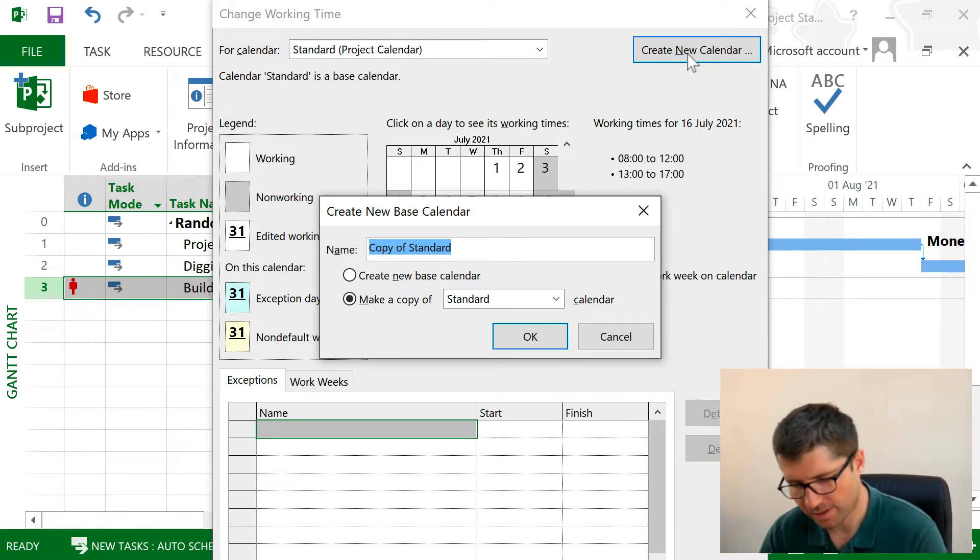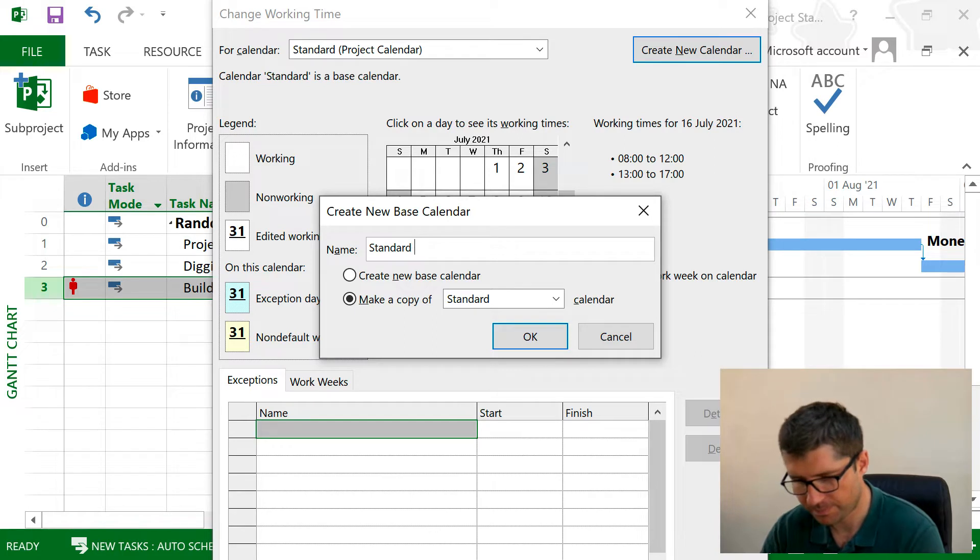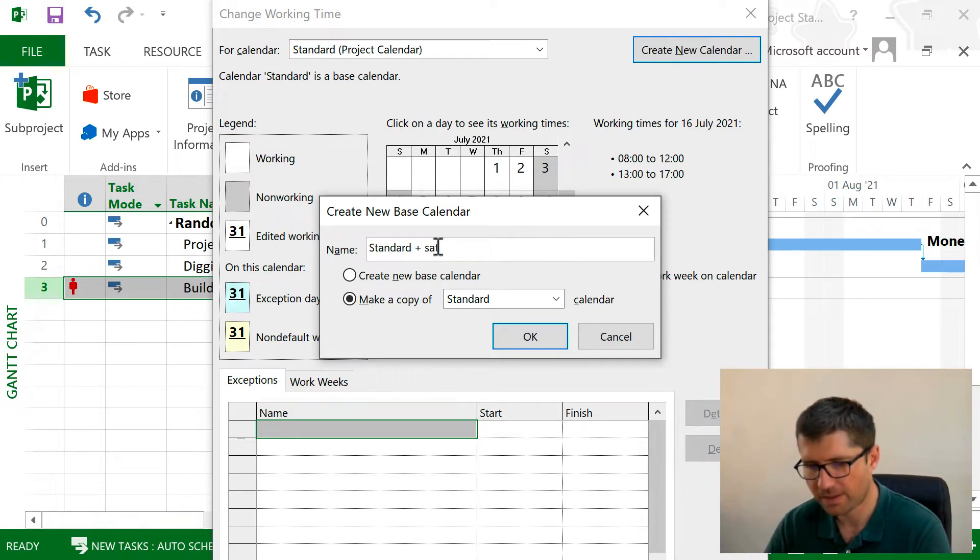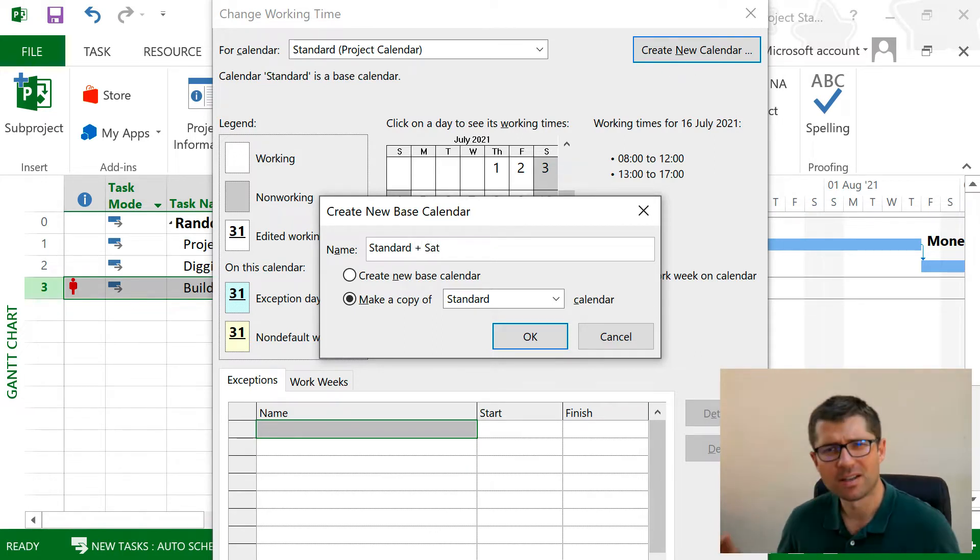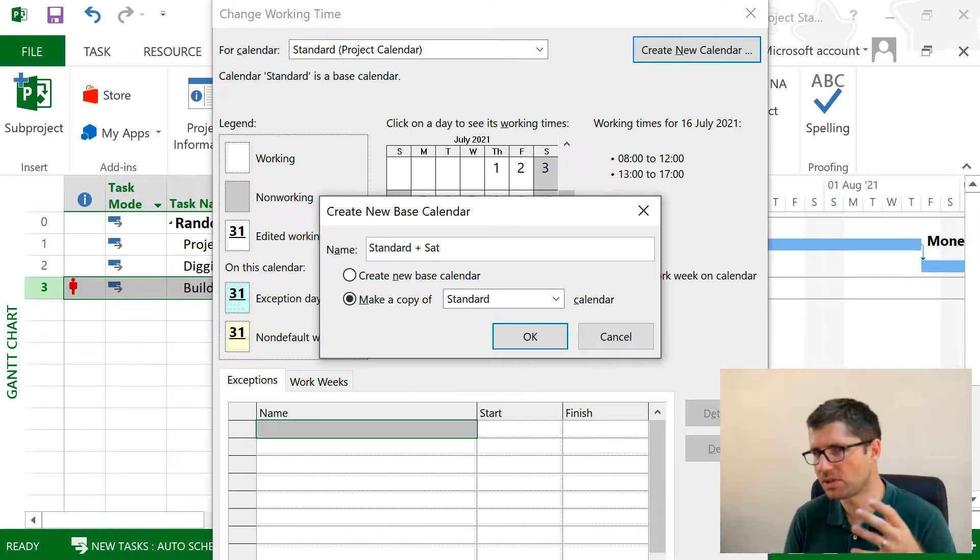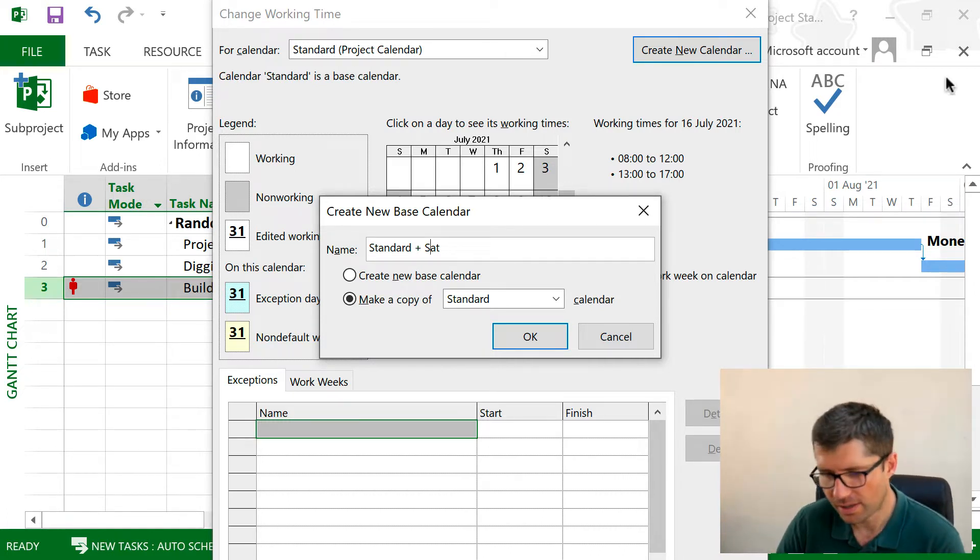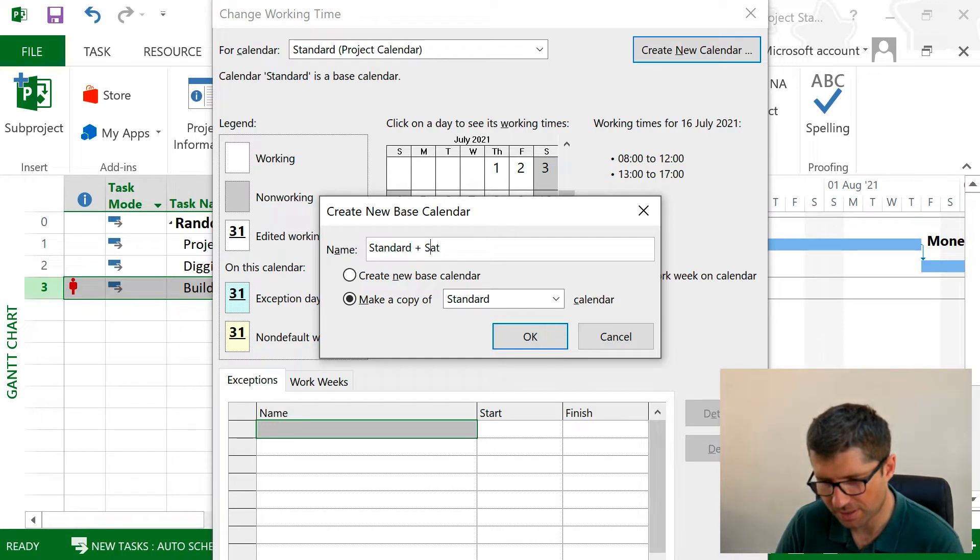Now let's have Standard Plus Saturday as the name. Usually I don't want to change the default calendar. When I do something different, I create a new one and make a copy of Standard and click OK.